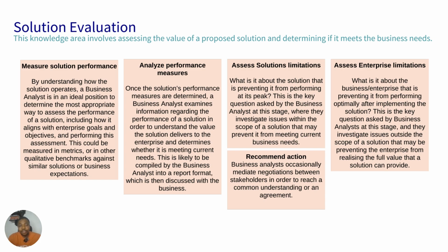You can use a wrong measure to test that your website is actually working, and you'll be very happy. Or imagine using social media shares and social media likes as measures to test whether your website is bringing value to you. If you have so many social media likes and clicks and your website is not converting and sales are not coming in, you might be fooled and carried away that your solution actually brought in value. But no, that is a wrong measure. So you need to analyze the performance measures you've selected to be sure that it is actually a valid measure to analyze the performance of your solution.